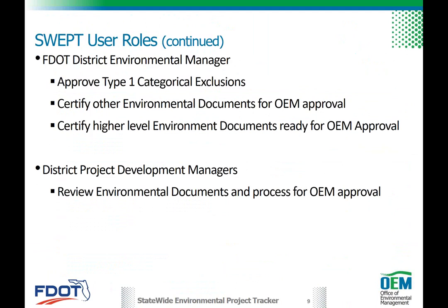They funnel up through the various district leadership for them to either approve or recommend and certify that it's ready to move on through approval as we go through the various process. And it's a 2-leveled approval process within the district. So simultaneously you would receive approval from the district environmental manager as well as the project development manager as well.